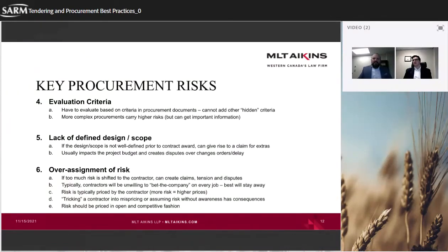Again, we have lots of incidental contract growth as a result of owner design changes or unforeseen conditions or unforeseen ground conditions, or even bad weather, extended winter conditions. These are all things that need to be considered within the budgeting of the process, but also can it really be managed in line with understanding what the scope is going to be, and trying to prevent contract growth before anything else happens there.